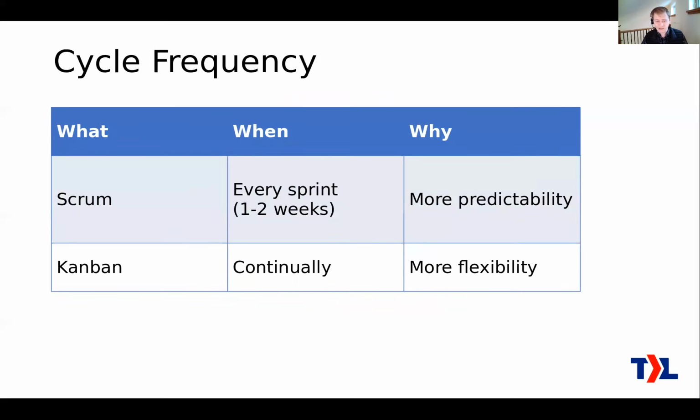So like I said, it's a cycle. So how often do you do it? There's a couple of common choices. You may have heard of Scrum. It's fairly well known, and mostly it comes out of software development, but there's no reason you can't use it at an MSP. What that calls for is cycles they call a sprint. That sprint is going to have a fixed length, maybe 1 week or 2 weeks. Those would be the common choices. And so the whole thing repeats every 1 to 2 weeks, whatever you decide is your sprint length.